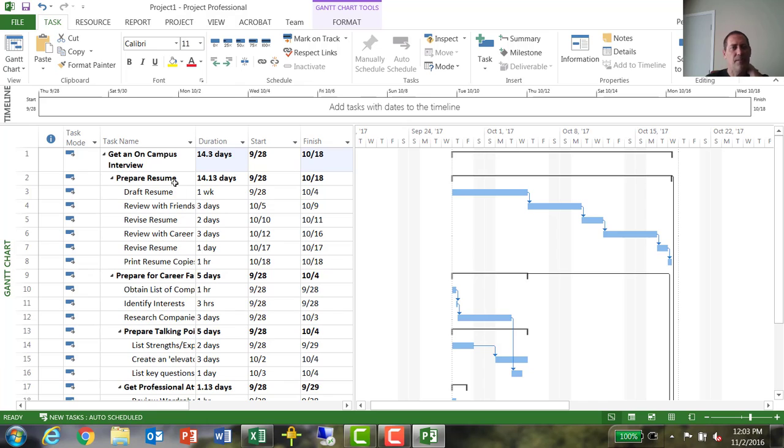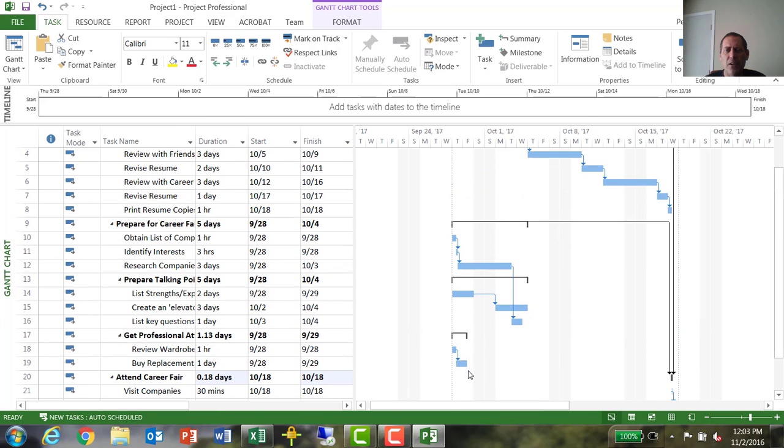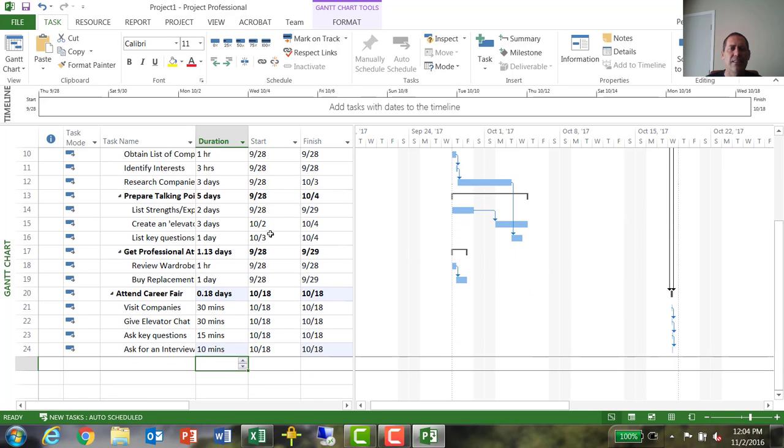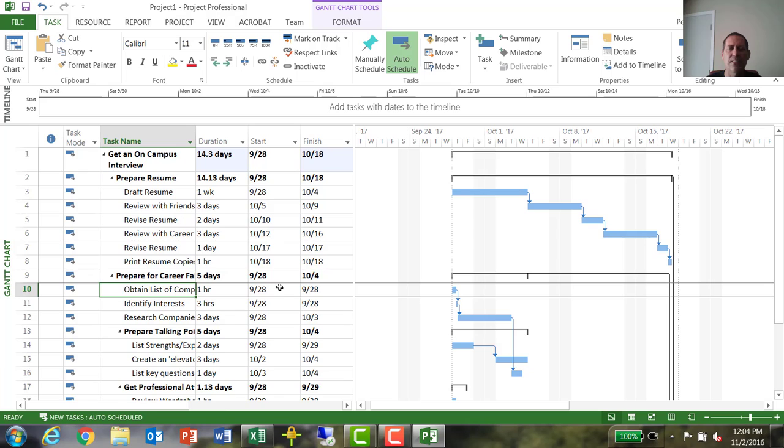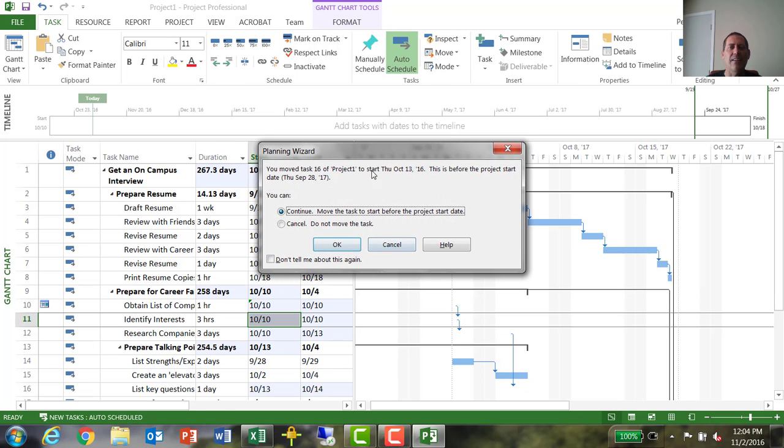All right, so now I'm going to take another look at this. How are things standing over here? Well, it's got me doing a whole lot right at the beginning. Does that make sense? Well, maybe not. Realistically, I can't really obtain a list of companies until it's available from the Career Services. And let's say I find out that Career Services is going to have that available on October 10th. So I can enter 10/10 here, and